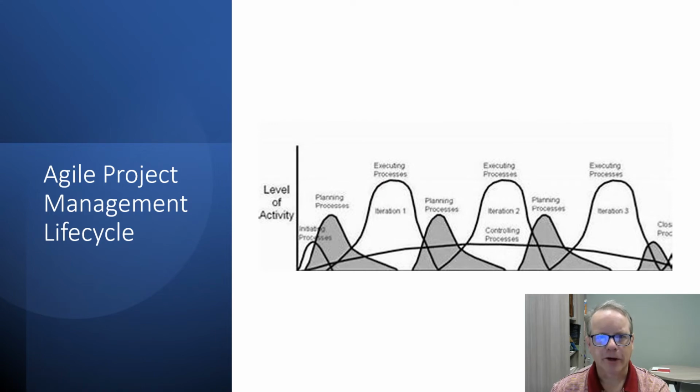Agile projects are done in iterations. Each iteration is meant to be a short project of sorts in its own. There's a bit of requirements gathering or refinement, some planning, execution, testing, and release. By breaking down a large project into these shorter duration, smaller scope stages, the likelihood of overall success goes up because we can fail fast or succeed fast. We can also adjust late in the process to changing conditions or new information.